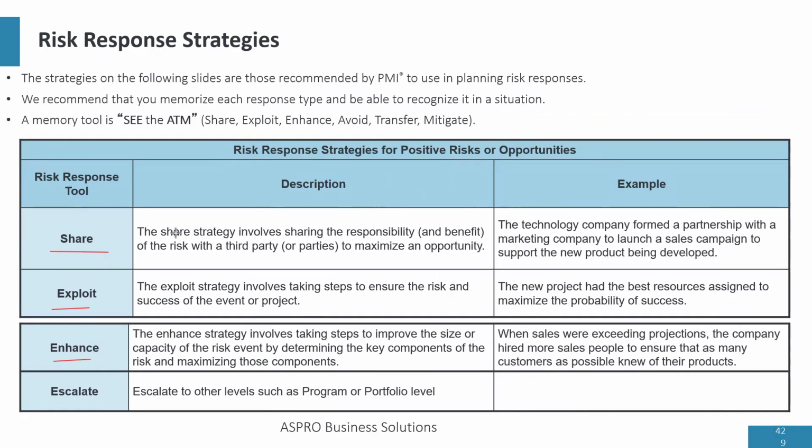So this share strategy is where we have partnership or joint ventures. Like in Nigeria, NNPC, the indigenous oil company, partners with all the major international oil companies. That's why we have NNPC, Chevron, NNPC, Shell. When it comes to extracting crude oil, they have technical partners and they share the profit.